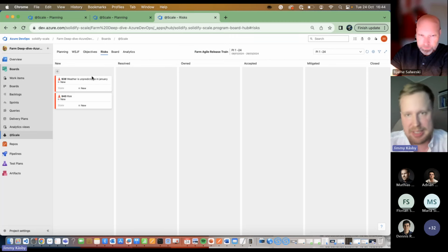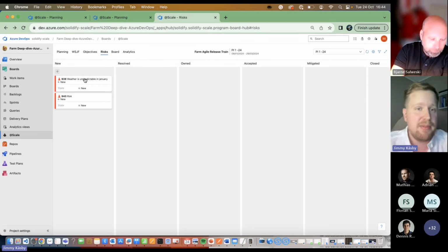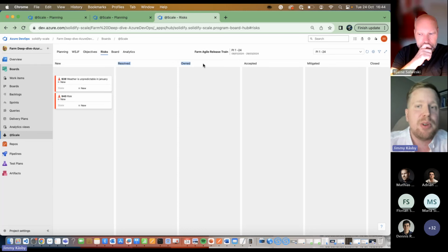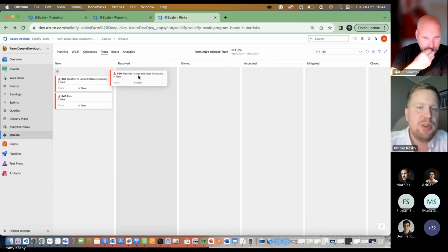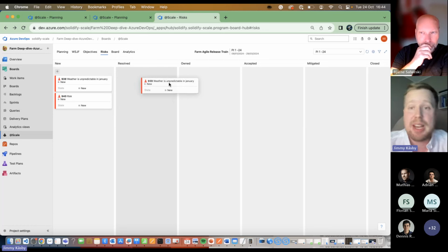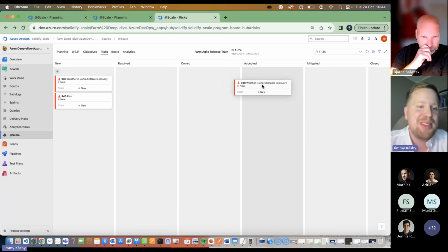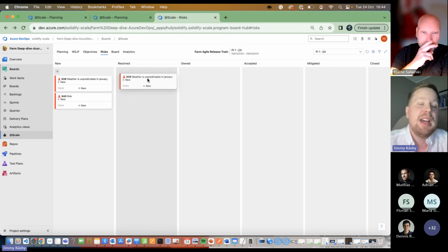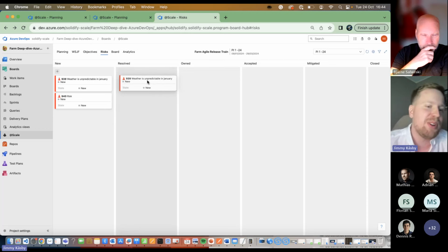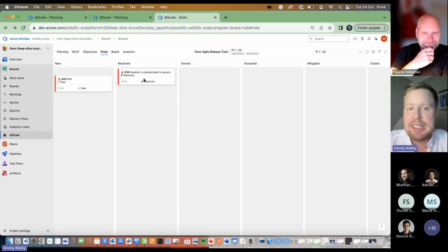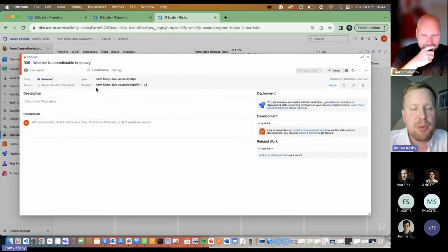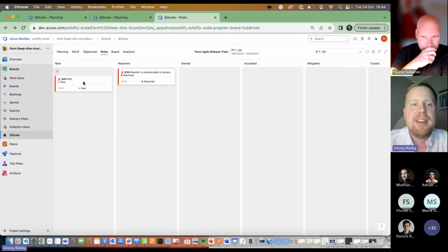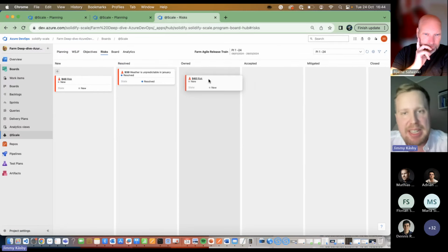And when you're going through the risks, which usually happens during the second day, you should add them to the resolved, owned, accepted, or mitigated, one of these states. So when you're going through the risks one by one, you add, perhaps, the weather is unpredictable. Yeah, what can we do? We can't really change the weather. Or maybe we solve it by building a greenhouse, so the weather isn't as important a factor that can impact us. So maybe I go in here, I write how we solved it, leave it there, and maybe something gets ownership of.